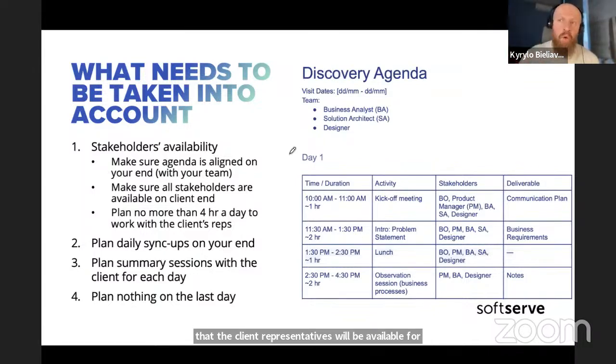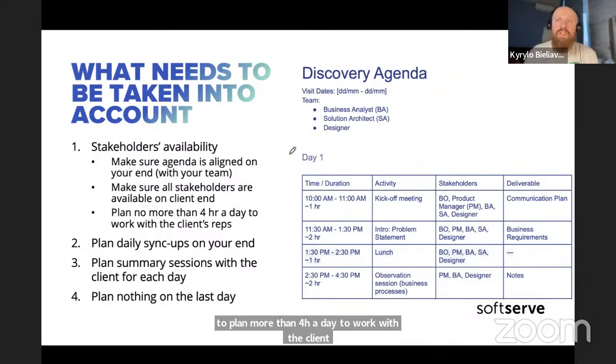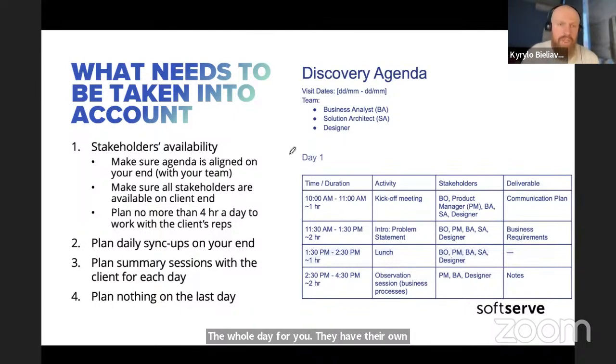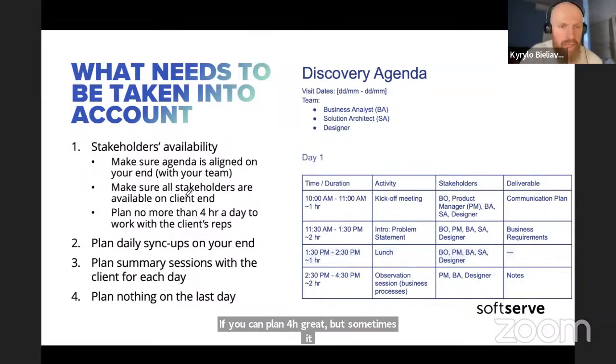For the on-site visit, I would also advise not to plan more than 4 hours a day to work with the client representatives. First of all, they will not be available the whole day for you. They have their own jobs, and they will not have all the time for you, and you need some time on your own or with your team to analyze all the information that you received and elicited. So don't plan more than 4 hours a day with a client. If you can plan 4 hours, great, but sometimes it can be even less, especially if it's an offsite type of discovery.